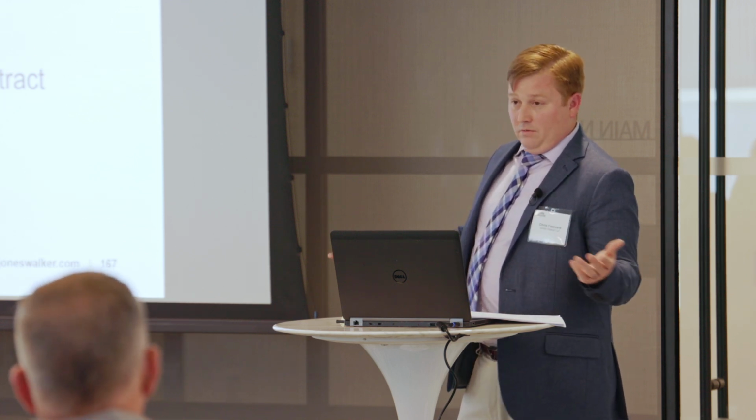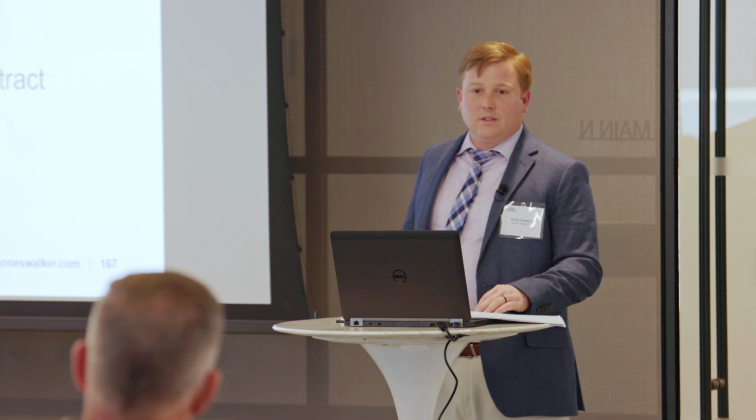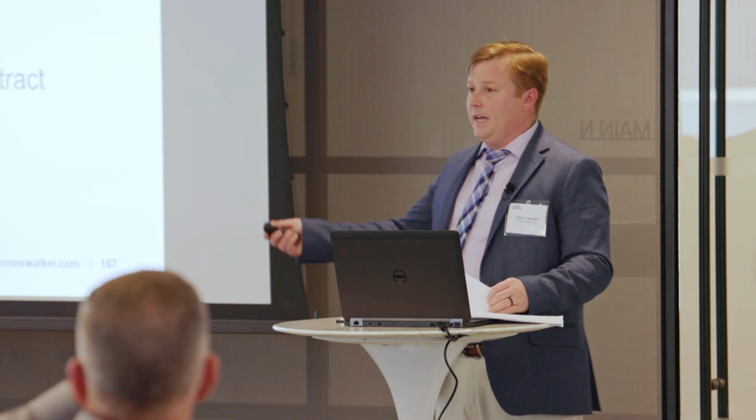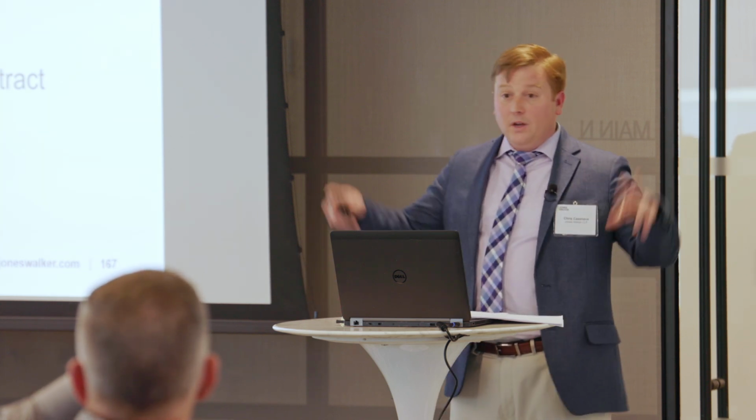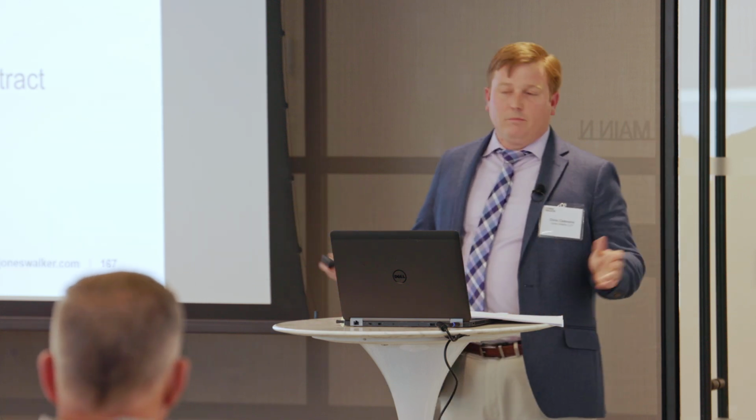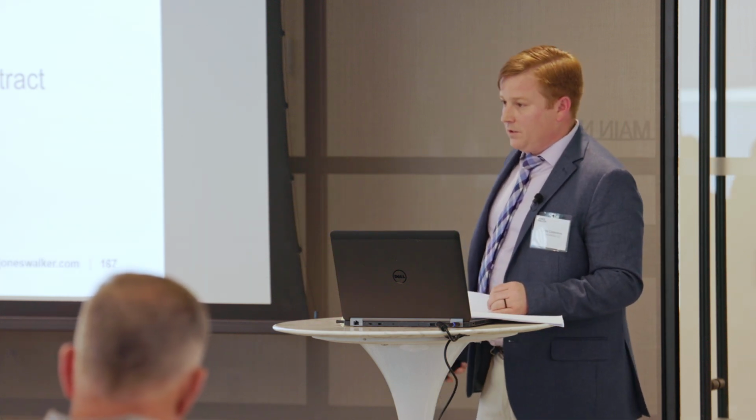For the owner, strict notice requirements make sense. To define it maybe like the AIA and use 21 days rather than prompt, to allow no room for error as to what constitutes sufficient notice. Another thing I see is that an owner tries to limit the recoverable cost to only direct job site costs incurred, so no home office overhead, no indirects, just the cost that are associated with the different site condition.